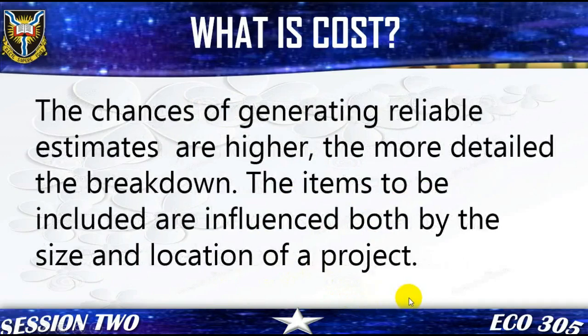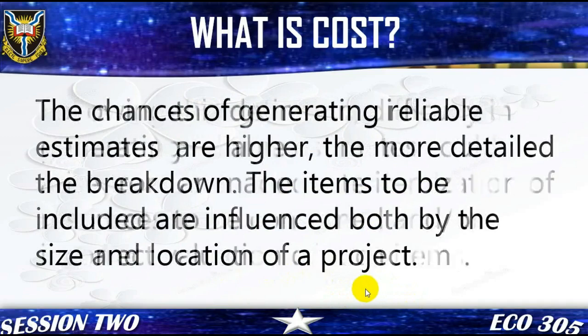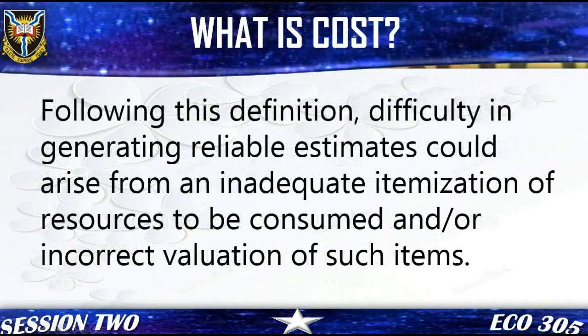Thus, in completing this itemization of resources, a breakdown of resources to be consumed may be necessary. Resources may be consumed gradually over a long period or consumed immediately. While capital items fall under the first category, operating items fall under the latter, but both items are consumed voluntarily.